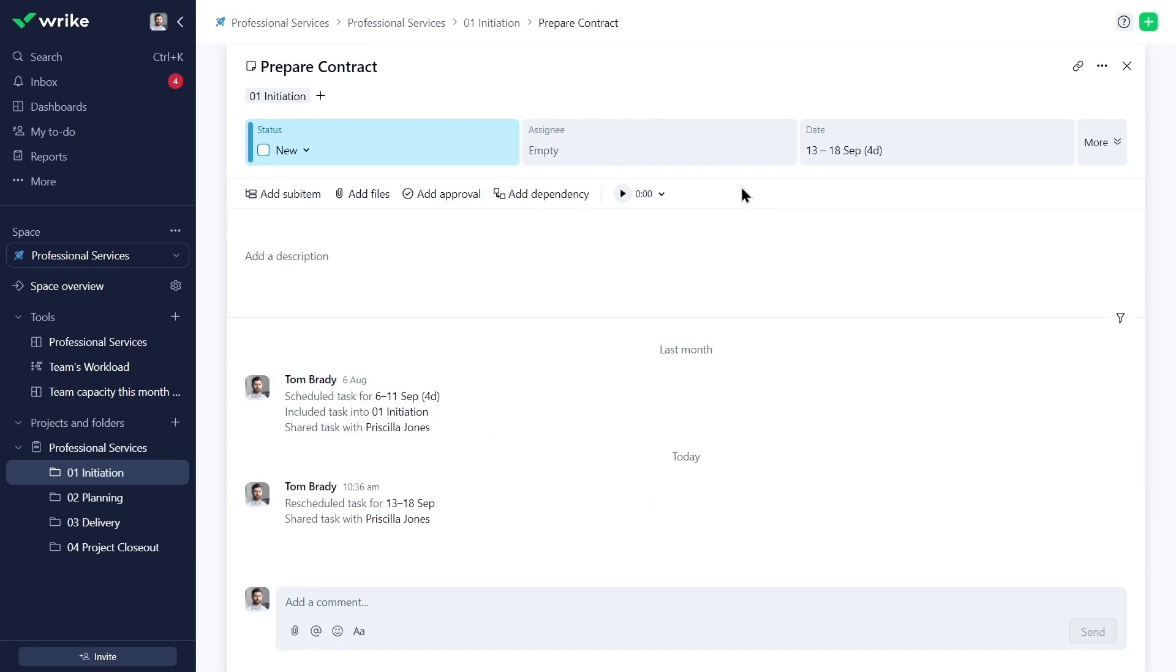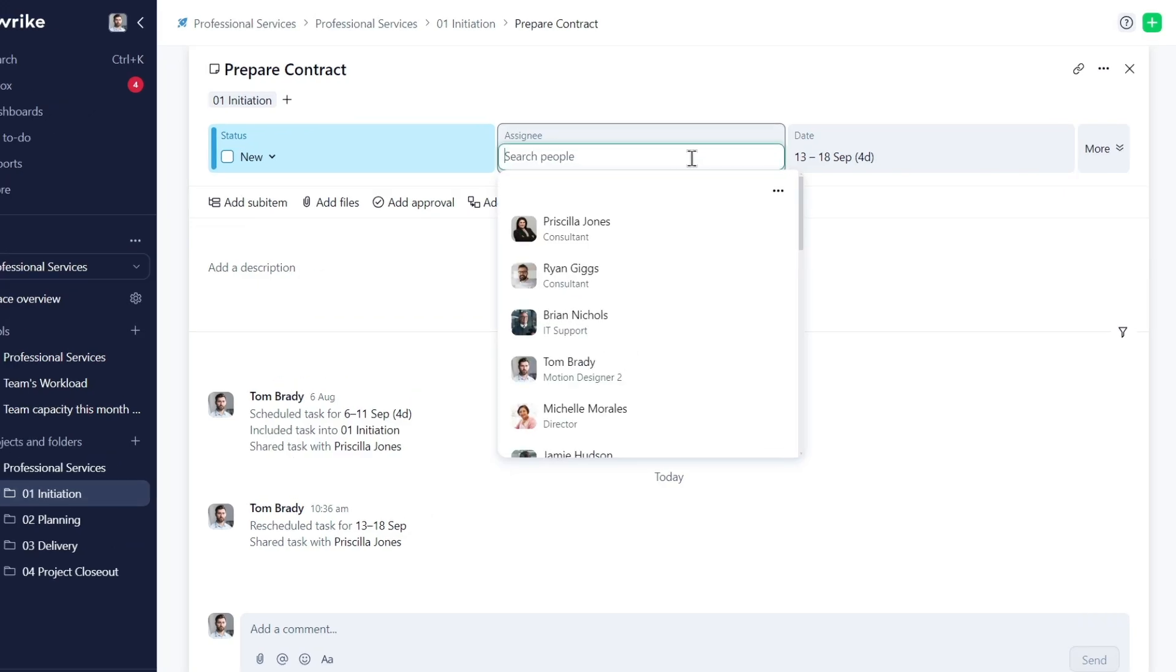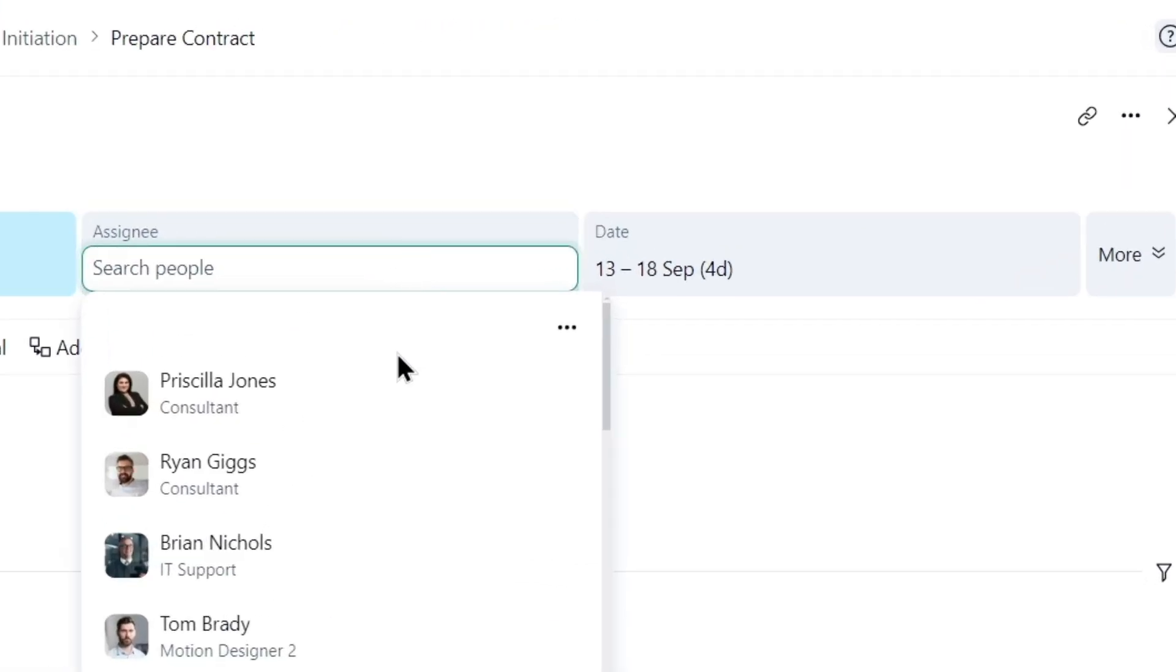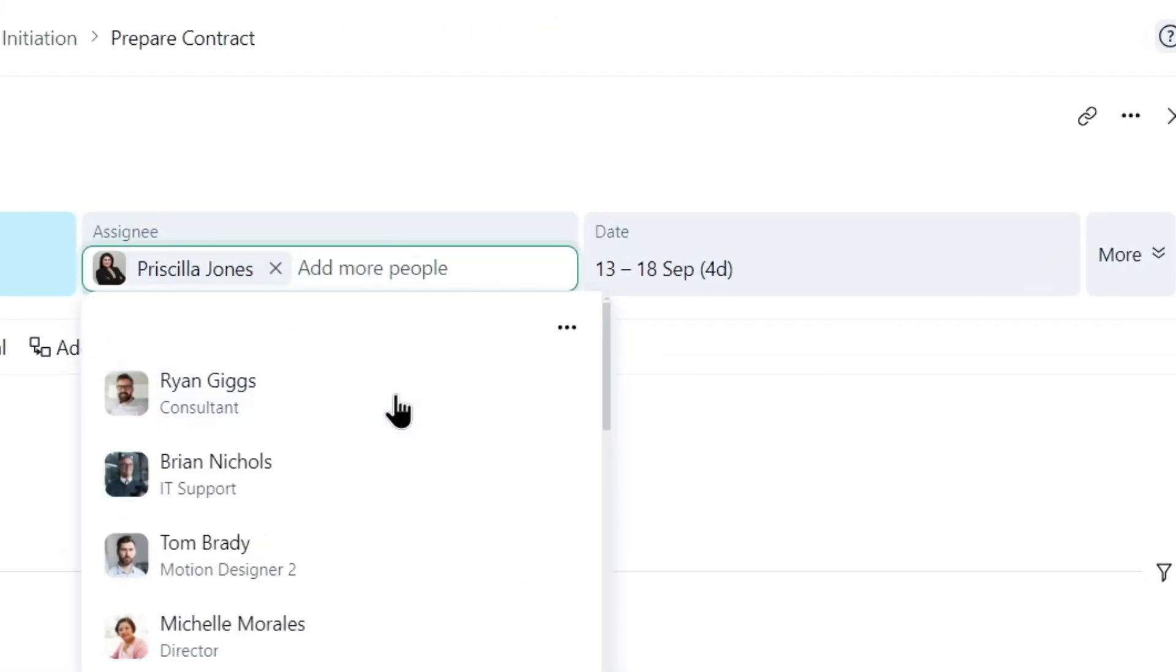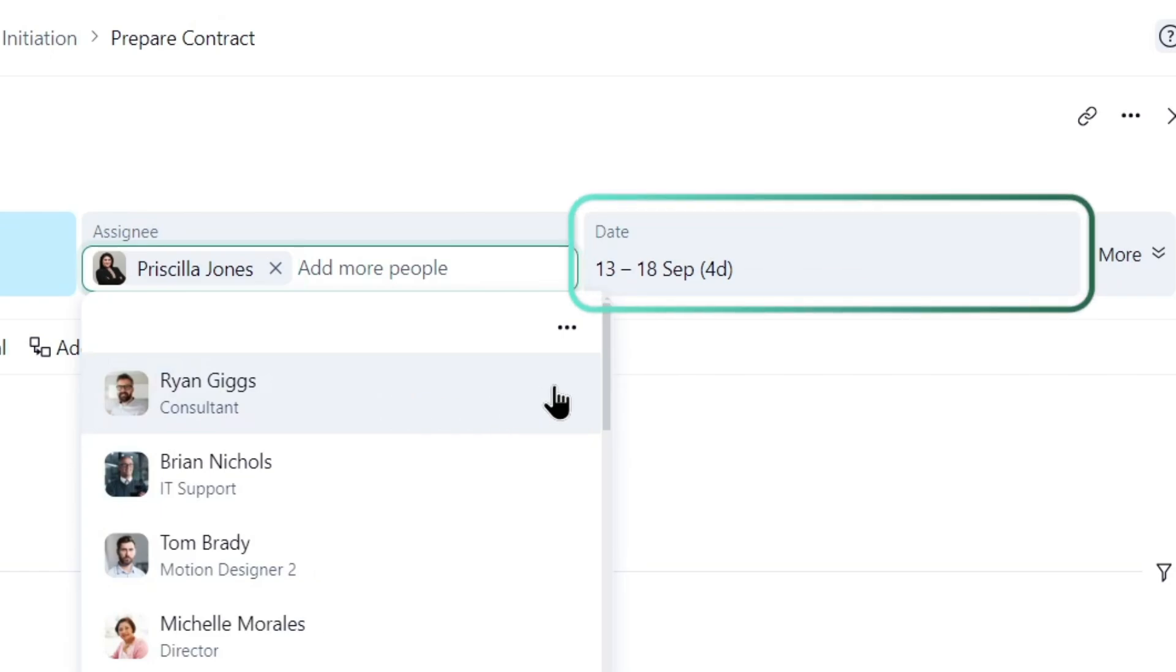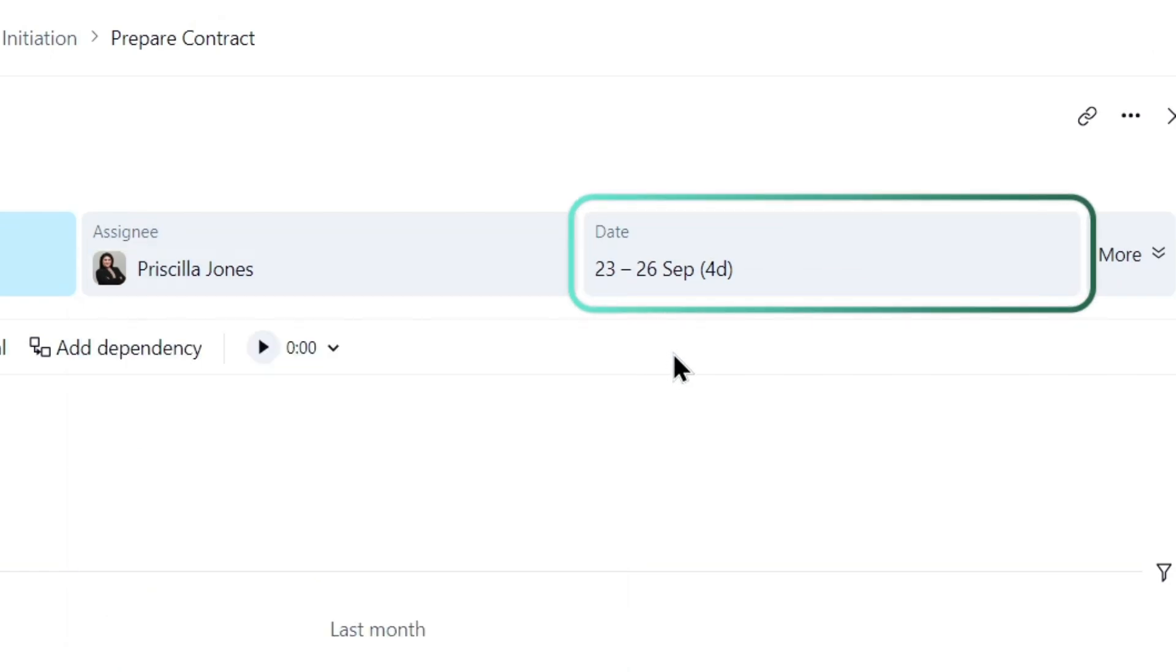This task was scheduled before being assigned to Priscilla. Since it conflicts with her vacation, the task auto-reschedules around the non-working days while maintaining the original duration.